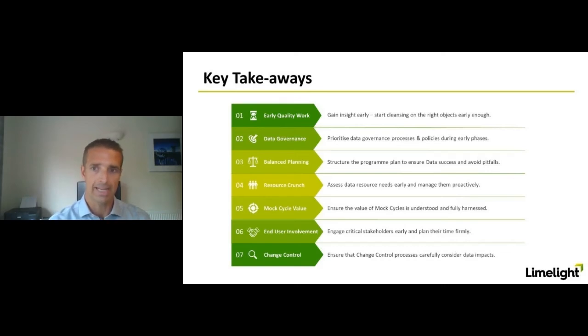Those kinds of things can, unfortunately, cause impacts on your critical path that can mean the program, and therefore go-live, and therefore the entire timeline slips. And in most of these programs, as most of us are aware, the cost of even a single month's slippage can be a 7-figure sum. Can be really, really significant. So that's the first and early financial costly impact of it.